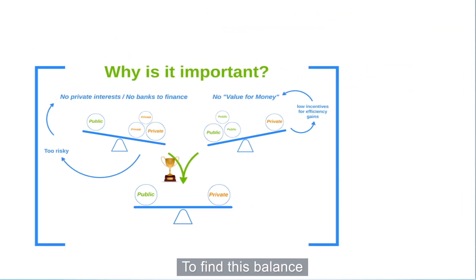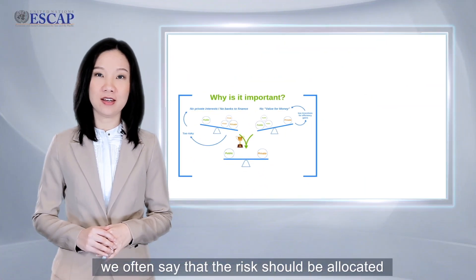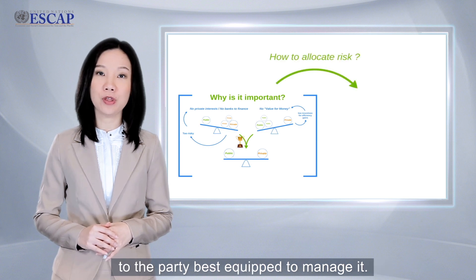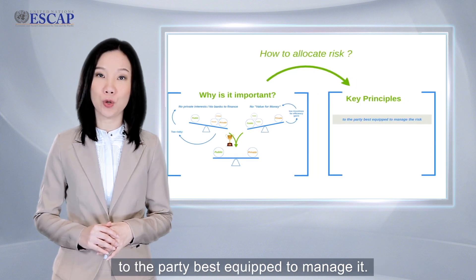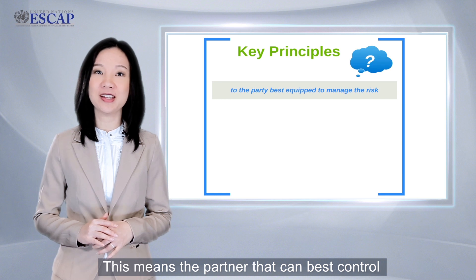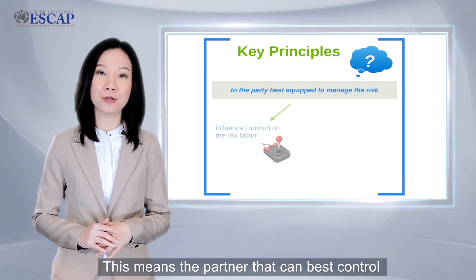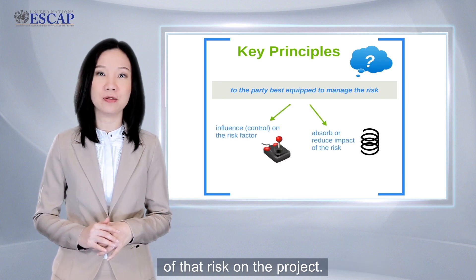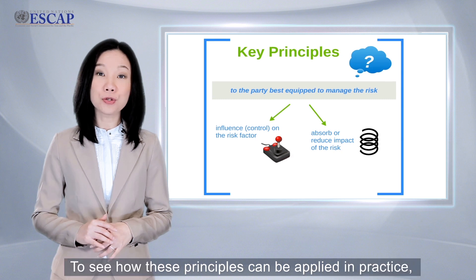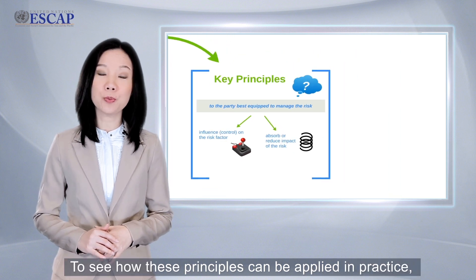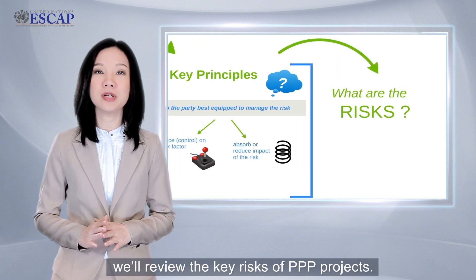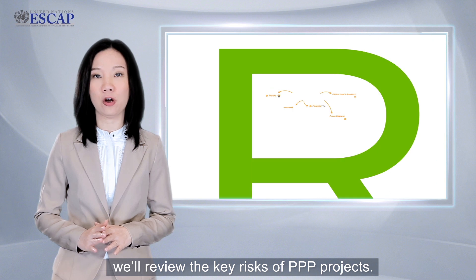To find this balance, we often say that risk should be allocated to the party best equipped to manage it. This means the partner that can best control the risk or reduce the impact of that risk on the project. To see how this principle can be applied in practice, we will review the key risks of PPP projects.